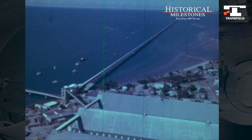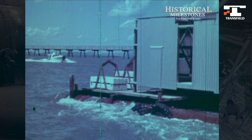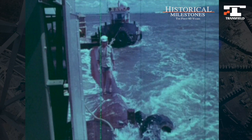From shore to ship, the sugar will ride to sea within aluminium-clad galleries. One gallery truss reached the worksite each day from Cairns, 300 kilometres to the north. Several teams then moved in to fix the aluminium floors and cladding, which totally enclosed the gallery. The cable trays, fire main and hydrant points, and the conveyor idlers were all fitted before the completed unit was barged out to the approach jetty.